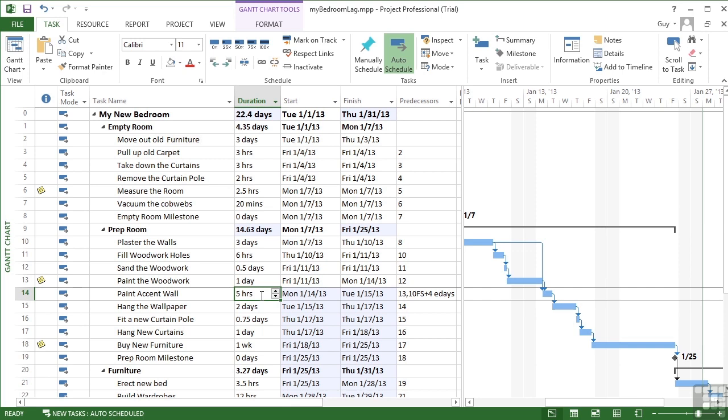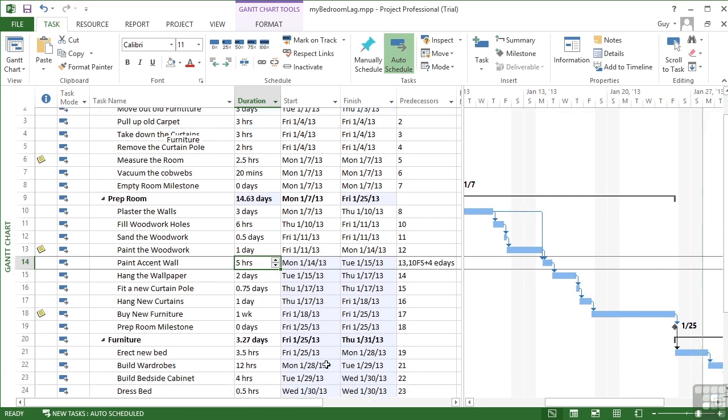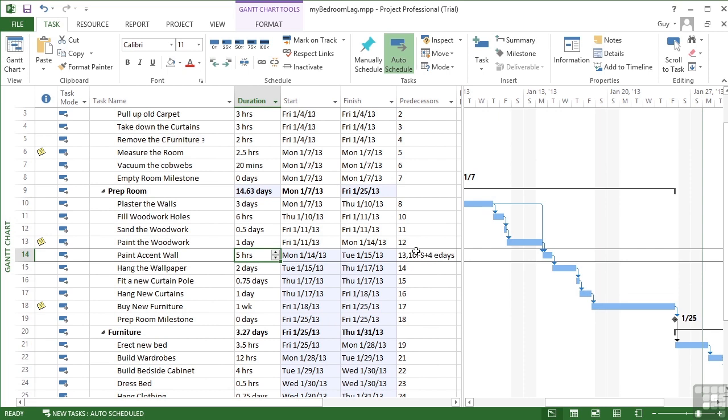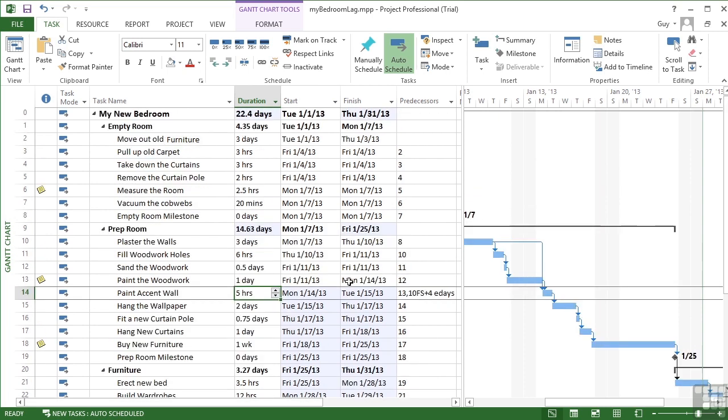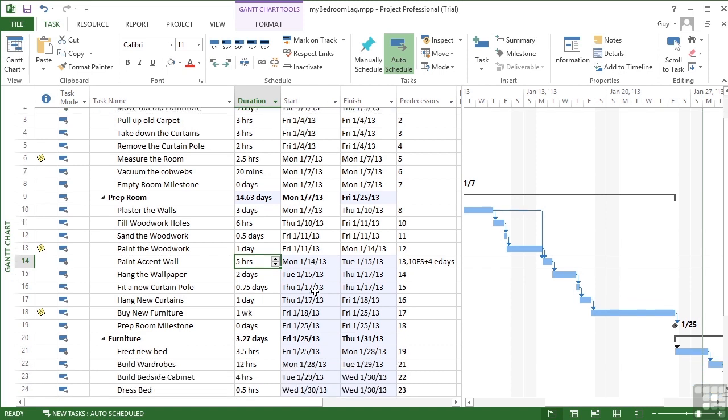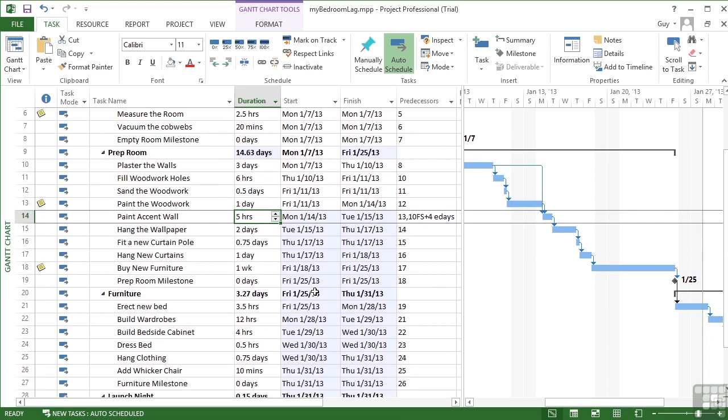And the other thing that you'll notice until we save, when you make a change that causes a knock on effect to the start and finish date and the duration, those changes are then highlighted in project. You see here these all start dates and finish dates have been changed by the little change we've done here of the elapsed date. That's caused a knock on effect to the duration of the prep room and a knock on effect to the duration of the whole project. So my new bedroom is now taking just a little bit longer. It's not a lot longer, actually. It's part of a day, but it is a little bit longer. So it's great that you can see the knock on effect immediately graphically in front of you.